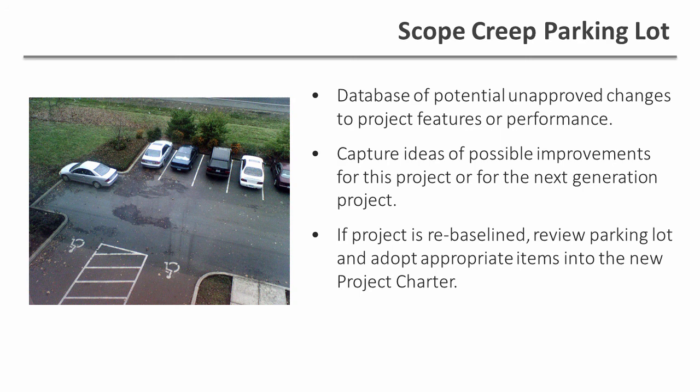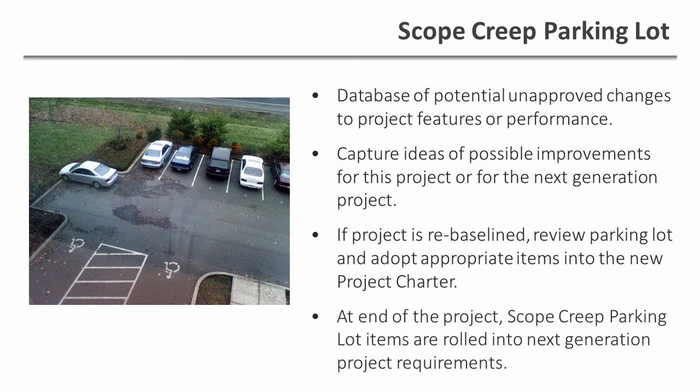Since we're already changing the project, this can be a good time to add something that maybe couldn't stand on its own, but it's still beneficial and appropriate to include at this point. At the end of the project, anything that is still on the scope creep parking lot is handed off to the next team or to whoever is to manage the results of this project for planning the next generation of the project work. Scope creep is a major problem, but it's one that can be managed. It can be controlled through these techniques that we've just reviewed.